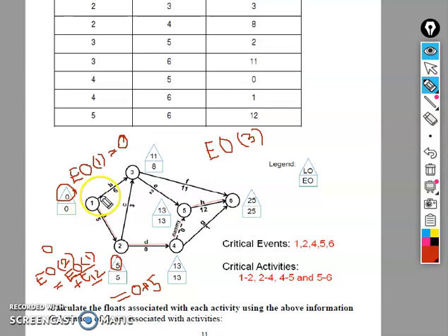One is to move from 1 to 3 directly, which gives 0 plus 6. The other path is 5 plus 3, that is 8.